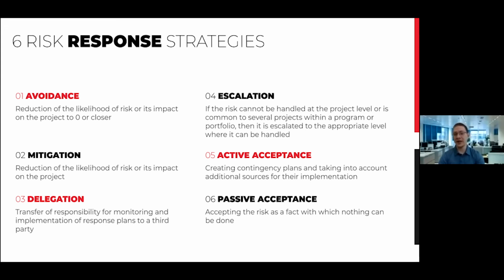Finally, we may accept the risk, actively or passively. If we can create a contingency plan and include the contingency reserve in our cost baseline, it must be an active acceptance. Otherwise, passive acceptance. These are all the strategies that we can apply. We may combine them or choose a single one for each particular risk.